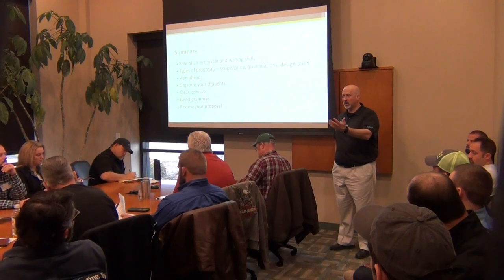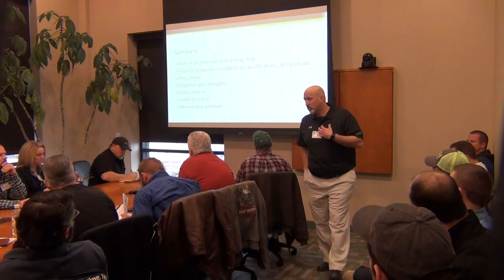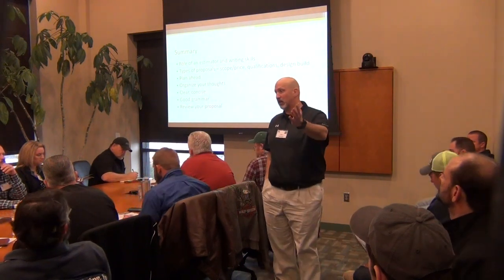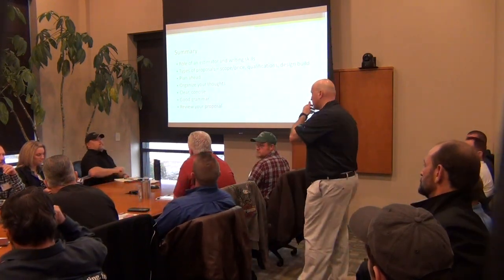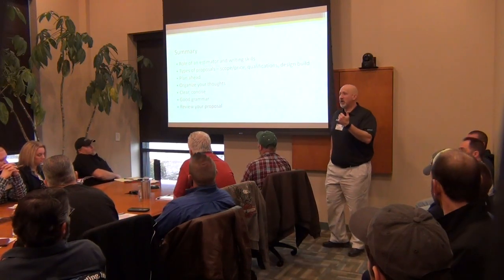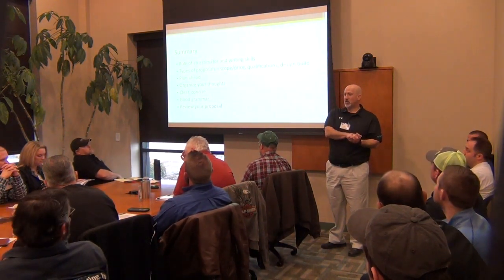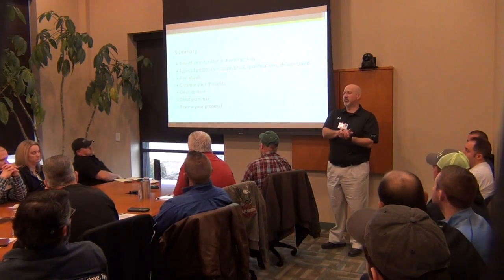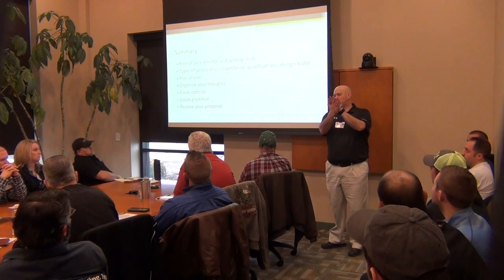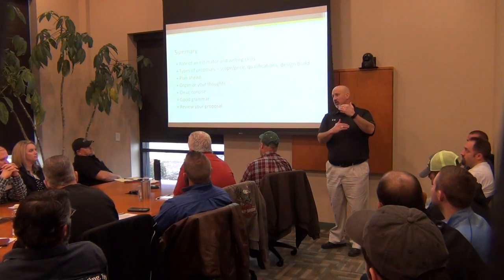Okay? AIA contract, right, or the EJCDC, or, we have our own contract form, just like I'm sure McCown Gordon does. They don't want anything in your proposal counteracting what's in their terms and conditions. That's why they don't want you to attach it. So what you have to do is be savvy enough to review their T's and C's and negotiate the things you don't like in there.